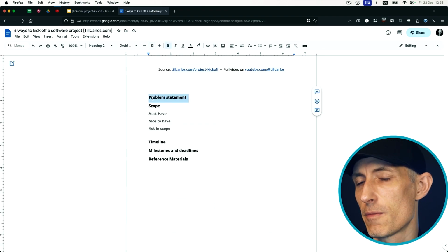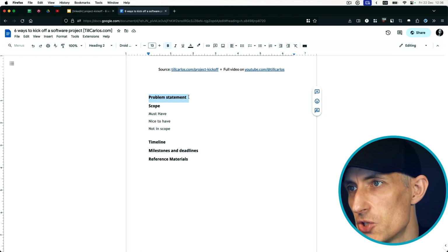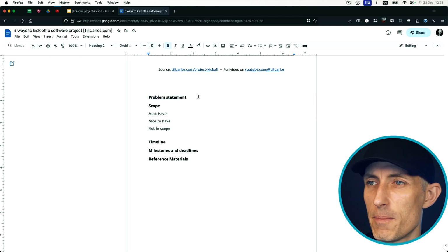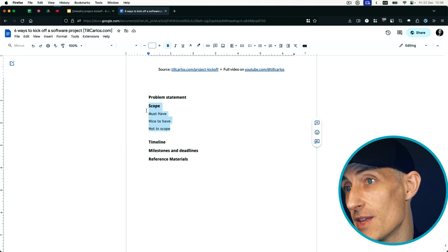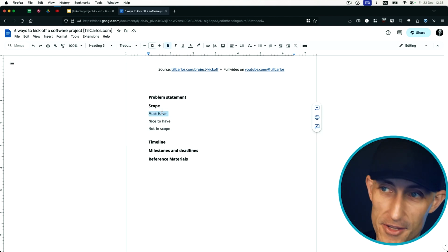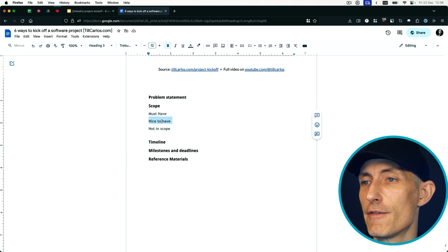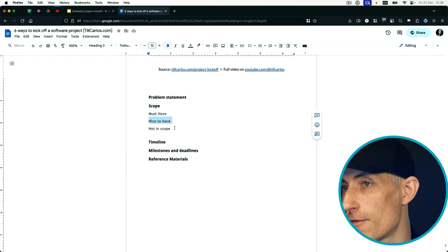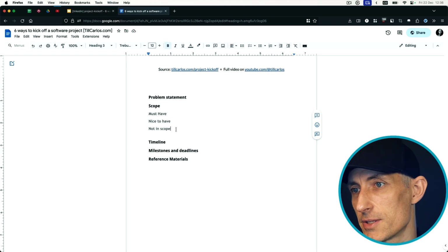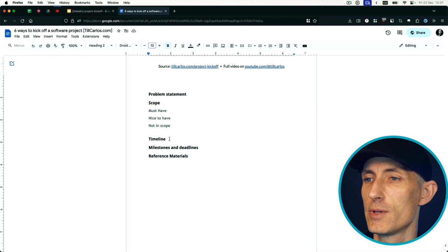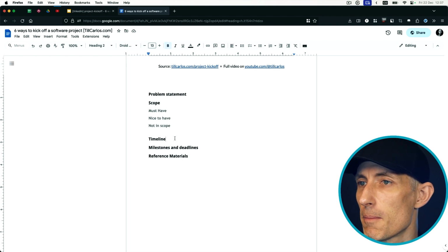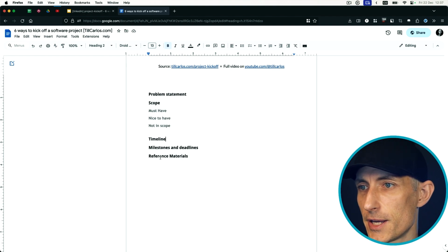What is interesting, we have a problem statement, meaning we need to state clearly why we are making this. And then also we have, basically, the definition of the MVP, because this is the MVP, this is our must-have. And then we have the things that we saw before from Frederick King, nice to have and not in scope. So this is a good middle ground, I would say, of a project kickoff template, which contains the most important things.